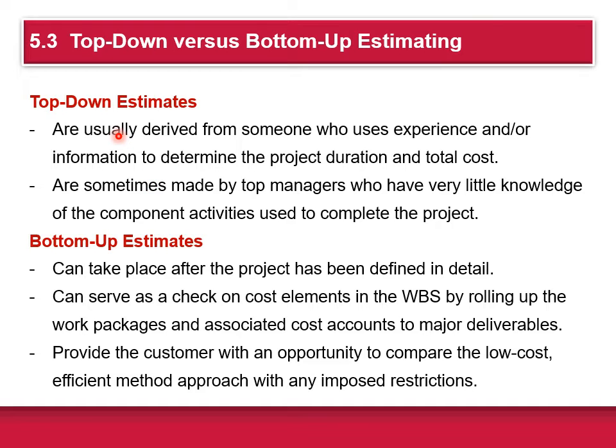Initially, the top-level management will do a top-down estimate, and as the WBS and OBS are developed and pushed down to the work packages, they'll also do a bottom-up estimate by rolling up the work package cost, and then they can directly compare the two, and they can iterate and get a better estimate of the true cost.